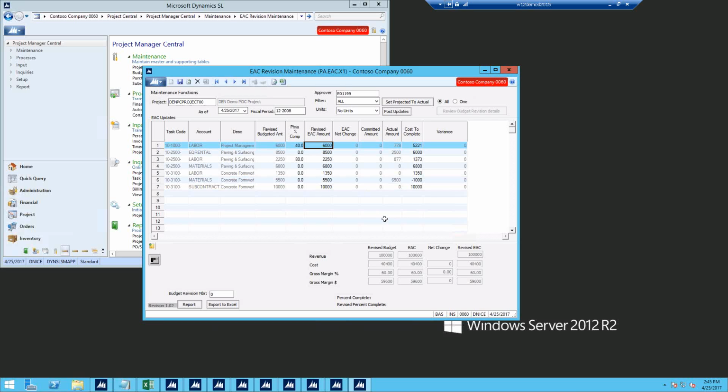Okay, so if you know that labor was supposed to be 17% of your project and labor in its own category is off 20%, okay, that's costing you 3.4%. Okay, so that's what EVM's all about, and that's what the EAC revision is trying to assist you and your project managers in managing the actual costs on a fairly real-time basis, as real as when the data is available.